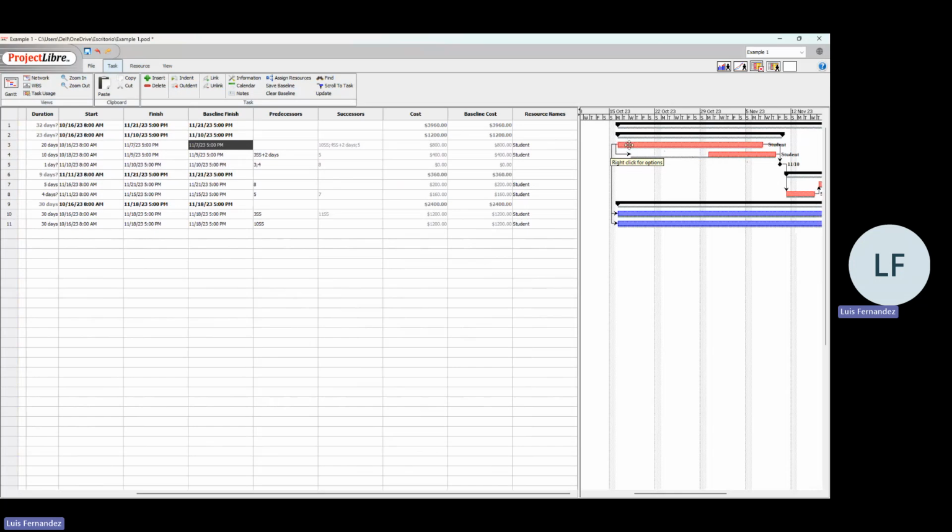We have a calculation, we have an estimation, but that doesn't mean that after setting the resources that will not change. So please keep in mind to plan activities and then add the resources. When you have plenty of resources ready for you, that won't be an issue. But the truth is, in the project management arena, you won't have all the resources available, and you need to start negotiating and start modifying these dates for your baseline.